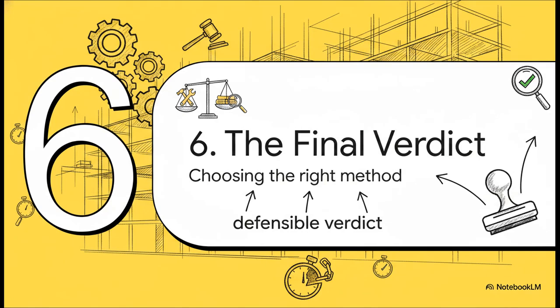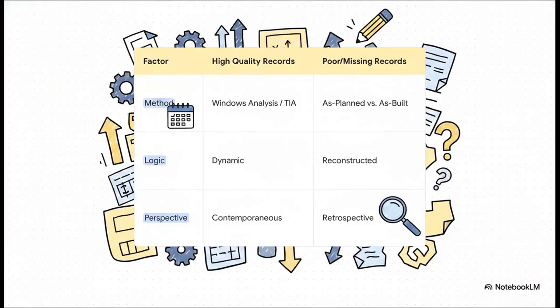All right, let's bring this all home. We've got the methods, we understand the absolute need for evidence. So how does an expert actually choose the right tool to deliver a final verdict, one that's going to hold up under intense scrutiny? And this table just nails it. The truth is, there's no single best method. The choice is driven almost entirely by one thing: the quality of your project records.